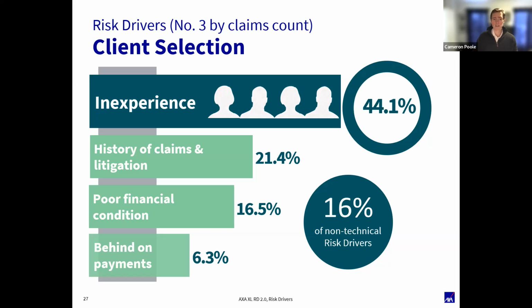So when you have a client that's inexperienced, like a single family homeowner, you've got to take the time up front to really get in depth with them and explain, look, these are the phases that we're going to go through. This is what we will be performing. This is what we won't be doing, right? These are the contractor's responsibilities. These are your responsibilities. You've got to have the conversation up front to try to educate them, because an educated client is far less likely to file a lawsuit or a claim against you.